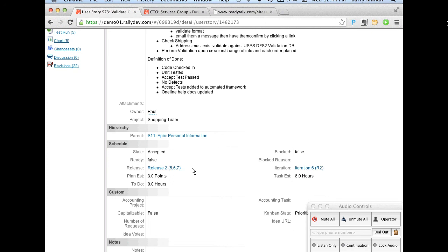So what we're looking for is a list of stories that are ordered by most important by the product owner, the current sprint, and we want to be able to drag things in until the sprint is full, and so the team capacity is overcommitted, and we say, okay, that's too much, pull this out, pull this in, right? Yeah, that's what you do. You pull from the release backlog in.